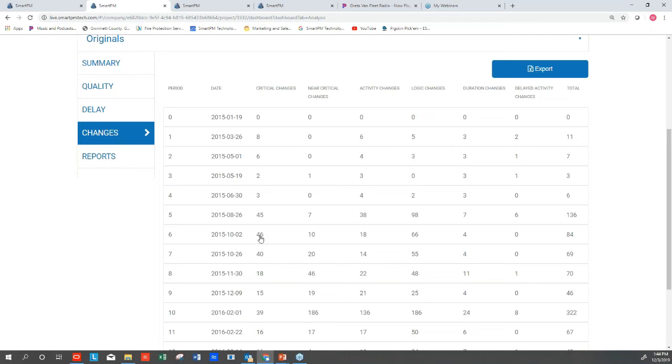Trades trip over each other. People start making plans for project delivery on time or in accordance with the schedule, whereas there's no way it could possibly happen if you actually studied the data, yet they've already planned for it and put controls in place to turn over at a certain point in time. In some cases, if we're thinking multifamily, they may already have teams of people coming to lease out space or people who have already purchased the property or have signed leases for a specific date. All of that comes with additional damages that if we don't have certainty on the end date at any given point in time, we run into a problem.